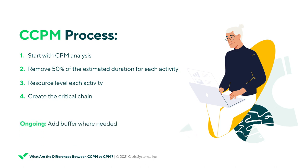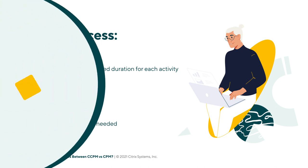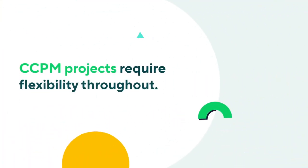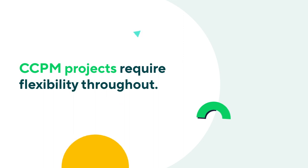Throughout the project, the project manager will monitor the pace of each activity. If an activity is taking longer than the scheduled duration allotted, they can reallocate some of the reserved buffer for those tasks. For this reason, start dates of all activities scheduled with CCPM need to have flexibility to be moved as needed.